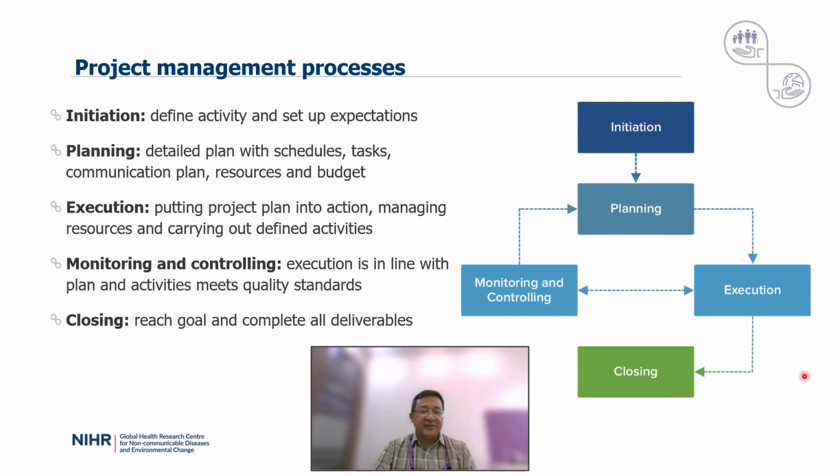So one of the groups last time had used this framework to make their presentations. So I hope they will be able to relate to this more. So the initiation phase is to define the activity and set up expectations, define the purpose, scope, and objectives of your activity. The planning phase involves developing a detailed plan with schedule, task, a communication plan, resources, and budget.